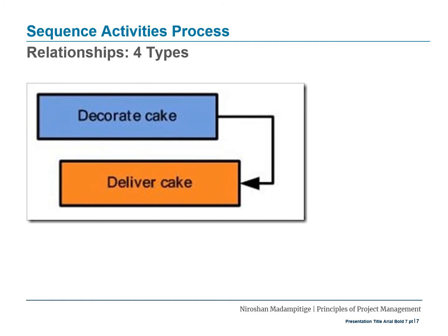The third type of the relationship is finish to finish. One of your tasks can't finish until another finishes. You can use a finish to finish dependency between them in this case. Finish to finish dependencies don't require that both tasks are completed simultaneously. They simply require that the first task be finished in order for the second task to finish. The second task can finish anytime after the first task finishes.